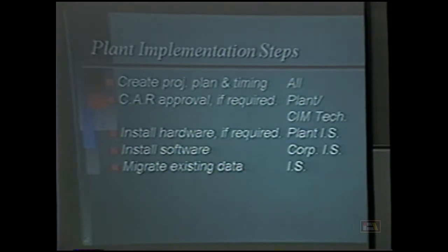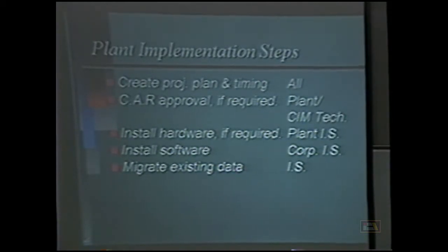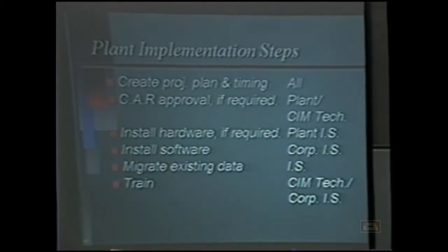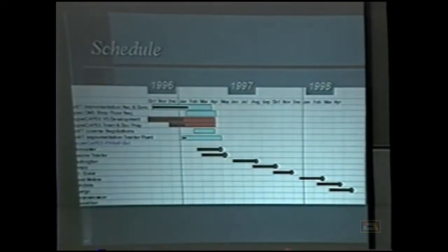Looking at some timing charts here, let me walk through some of the logic. We're tracking here with our implementation of Raft, and we're looking at specking out some of the shop floor requirements, how we're going to interface, what we want it to do, how we want it to work. So we haven't started that yet. Version 9 development's in process. We're going to be installing it here at Doncaster and Racine on the beta versions, and it should be done if they track the schedule by April.